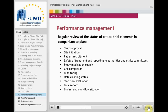Another key date everybody asks the project manager for is the database lock — the moment when all patients have completed the trial and all data have been entered into the database and are clean, so that the statistics department can start to evaluate the data. The date of provision of high-level results is the time point senior management and shareholders look at to see if the treatment has actually worked and if statistically significant differences were found between the treatments. The project manager's task only ends once the last trial activities have been performed, all trial sites have been closed, documents archived, the trial reported in a final report and in publicly accessible databases or publications, the trial master file completed, and all payments made.